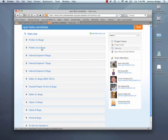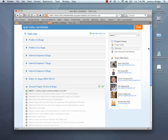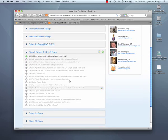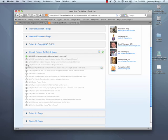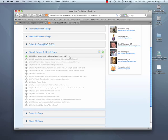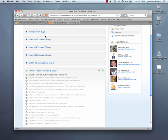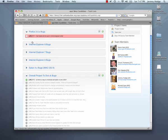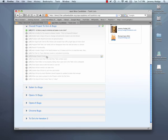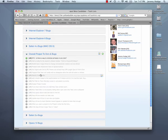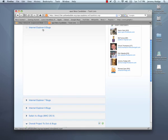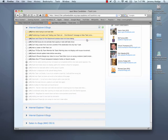So if we go ahead and open up one of these task lists you can see here we've got a list of to-dos that we need to get done, their current status, who they're assigned to, a due date if there's one assigned and then a one line description of that task. There's three different states for tasks. Here you see that these are completed. This one is in process and if we look at another one here, this is not started. The red bar indicates an overdue task. As we saw before, we've got some here in the Explorer 8 bugs. The yellow indicates unread documents.